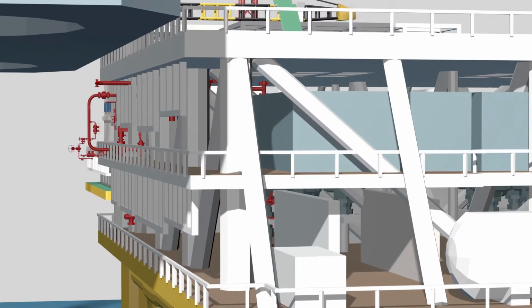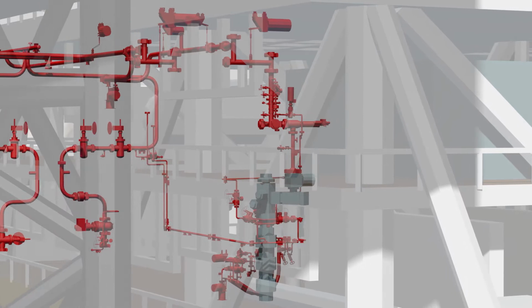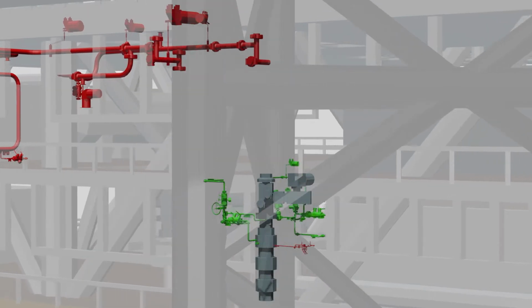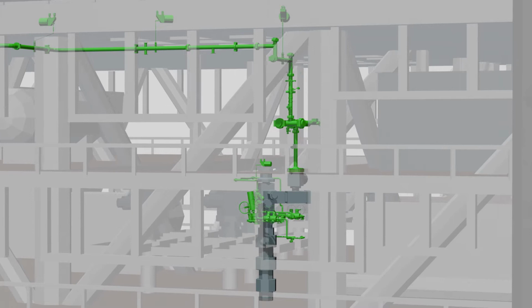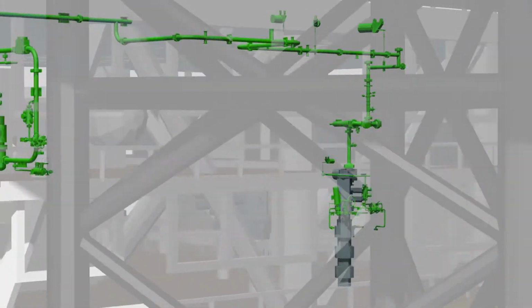Meanwhile, on the top sides, flowline design was simplified and streamlined. Every pipe spool, valve and instrument was assessed for its value to the well, and its design was modified. Major pipework spools were also redesigned to allow more construction to be done ahead of the well completion. This reduced the critical hookup and commissioning period.